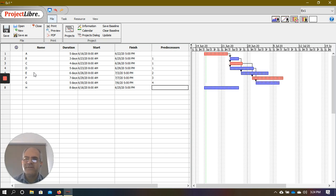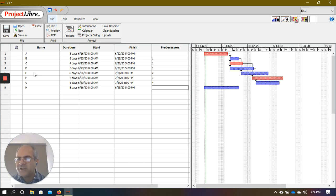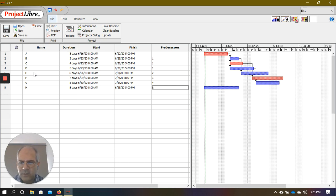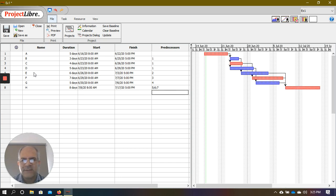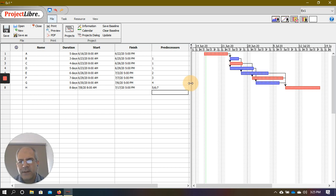The last activity, H, has three predecessors: E, F, and G — that's task IDs 5, 6, and 7. I'll enter them as 5;6;7. You can also use commas and the software will automatically convert them to semicolons. After pressing enter, notice how all the start and end dates change based on the predecessors we've entered.